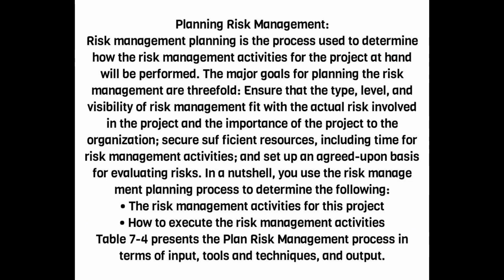Planning risk management. Risk management planning is the process used to determine how the risk management activities for the project at hand will be performed. The major goals for planning the risk management are threefold: ensure that the type, level, and visibility of risk management fit with the actual risk involved in the project and the importance of the project to the organization, secure sufficient resources, including time for risk management activities, and set up an agreed-upon basis for evaluating risks.